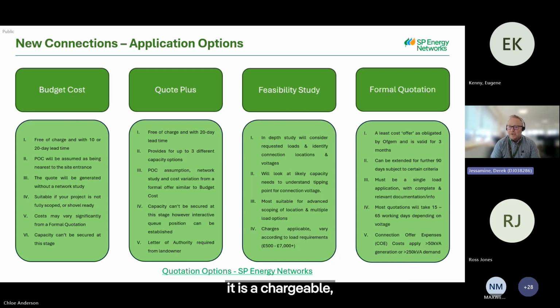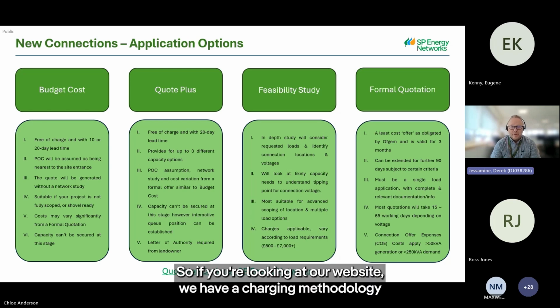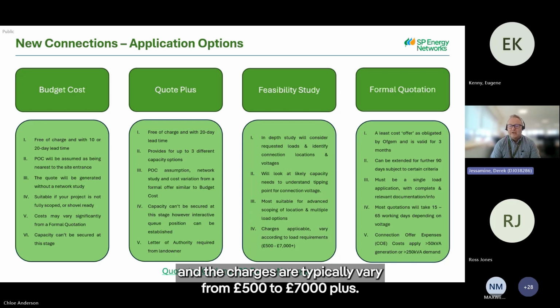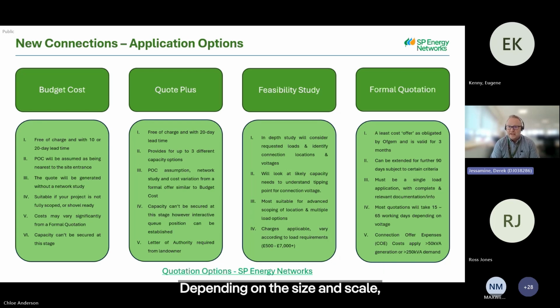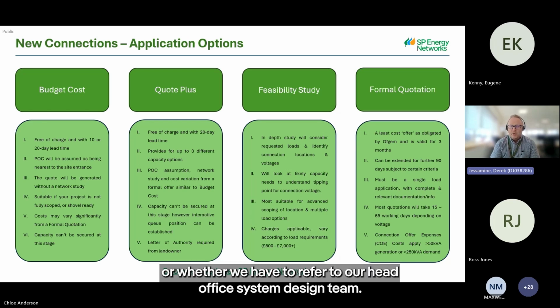However, it is a chargeable type of offering, and it'll vary depending on your load requirements. So if you're looking at our website, we have a charging methodology, and the charges will typically vary from £500 to £7,000 plus, depending on the size and scale of what it is you're looking for, and the detail required in the feasibility study, and whether it's something that we can do within the local connections team, or whether we have to refer to our head office system design team, and again depending on the scope and scale of the project.